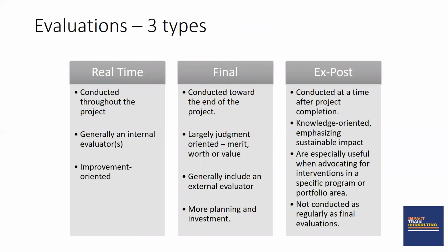According to the PMD Pro guide and in the international development sector, there are typically 3 types of evaluation that we will be carrying out. We have the real time, which is also known as the midterm review. And then we have the final evaluation, which is also known as the end of project evaluation. And then we have the ex post or post-project evaluation.